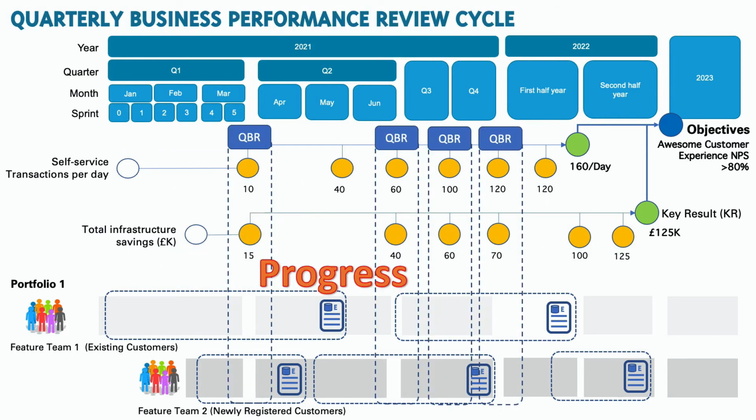Organizational agility calls for the adoption of a quarterly business performance review cycle, which requires the business cases to become living documents, rather than being confined to the bottom drawer once they've been approved. The quarterly business performance review cycle occurs every 3 months, within each portfolio. The primary purpose is to assess the variety of KPIs and their progress towards meeting the key results. Regularly reviewing performance in a rigorous manner enables the portfolio community to determine whether any significant changes to the makeup or priority of an individual or number of Agile teams are required because of any internal or external factors.